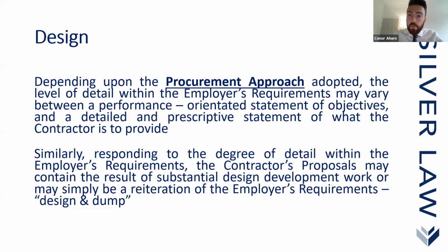And I think that's one of the benefits provided to employers when they adopt a two-stage approach, because they actually get feedback from the contractors as to where there may be some deficiencies, or where there may be some information missing in the first round of tendering. Obviously, from the employer's point of view, he doesn't need to go back to all of the parties who tendered at the first stage, usually where the price is simply not in line with the other prices which the employer may have received.